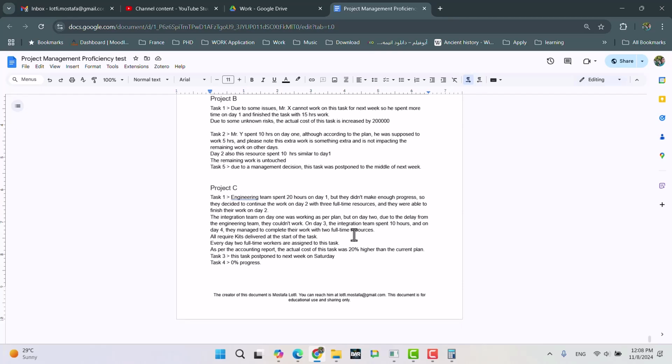What you need to do is get the information on what exactly happened during the report period and reflect it inside Microsoft Project, and then check how much the cost is, what the impact on the duration was, how much delay we have, whether we have a resource constraint again, whether we have a budget and cost constraint again, whether our planning for the future is aligned or not, how many delays we expect, what we can do to improve the plan, and how we can recover the delays.